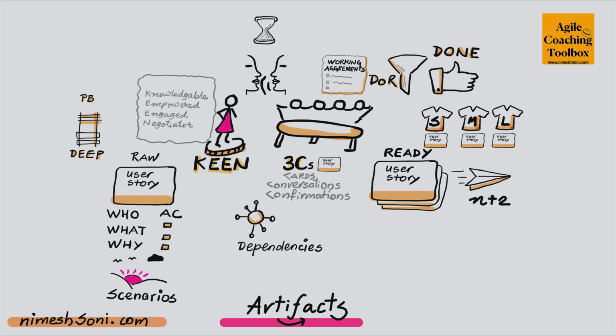These are some sample stories that the team is keeping visible so that the stories that are on the table, stories that are in the center of the table, stories that are part of the conversation that the team and the product owner are having, they can compare this story with those baseline stories to get that relative effort estimate. So I would expect to see some sample baseline stories with clearly marked estimations.